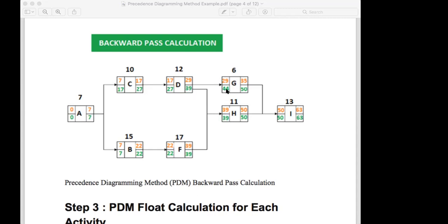So you have to put not only 44 here, you have to put 39 here. So now 39 here, reduce 12, it will come to 27 here. So now this is one network, 27 here, minus 10, 17. Then 17 here. This one you can't change. There's a start one. So it will be 7.